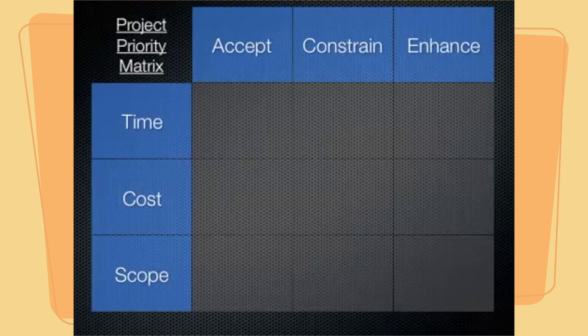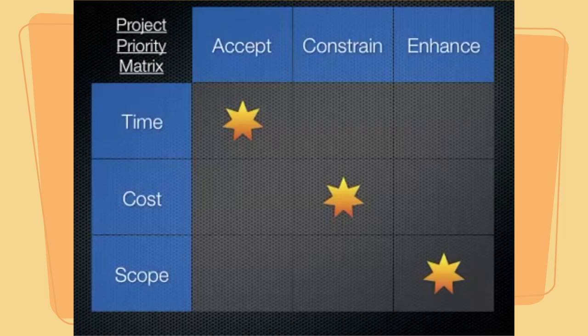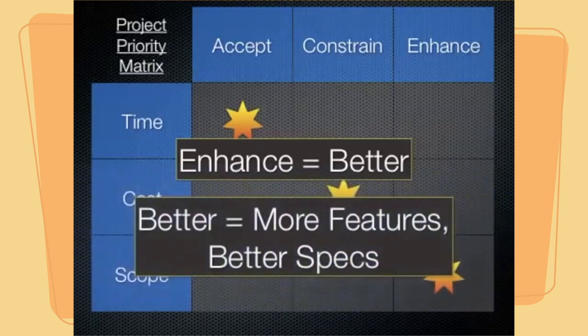Let's consider an example of a project in which the stakeholders are willing to accept a change in time — meaning a longer time to completion — but are not willing to accept changes in cost, so cost is constrained, and would like to enhance the scope if possible. In this case, the scope might be enhanced as long as it only leads to a longer time to completion, but not if it means an increase in cost. To enhance the scope means to make it better — adding more features, having better specifications, making this a better project in some aspect.